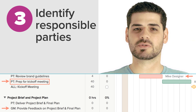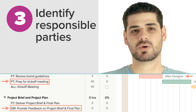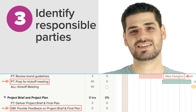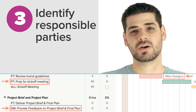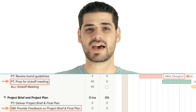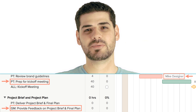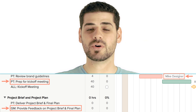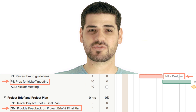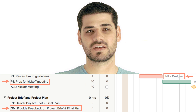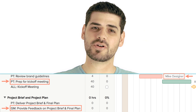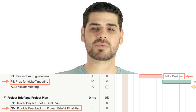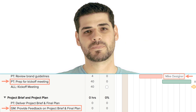Identifying who is responsible for each task will help your readers to easily seek out their own tasks. When creating a task, you can easily put the team name or an acronym in front of the task. You'll also want to take that a step further and assign a responsible person for each task.